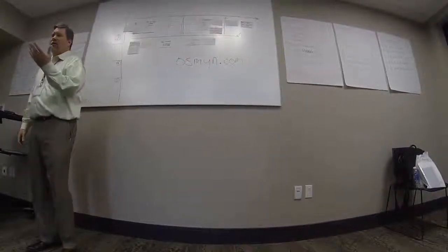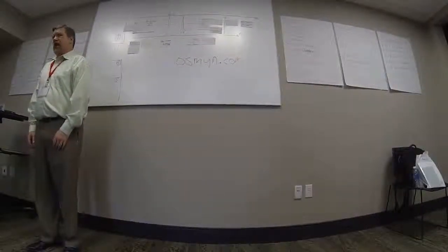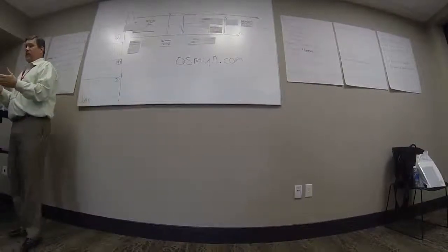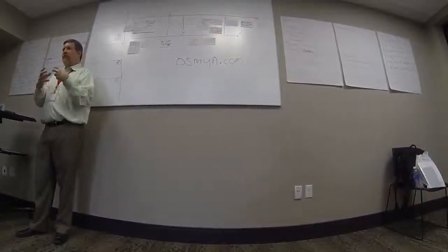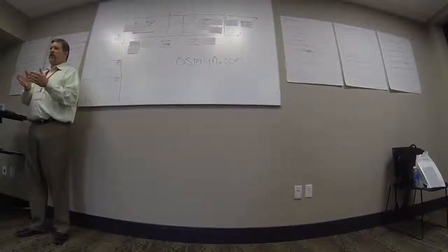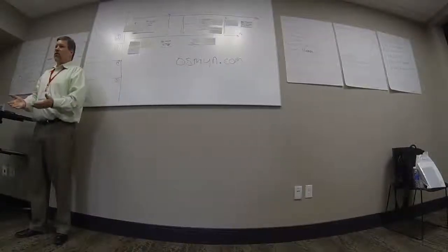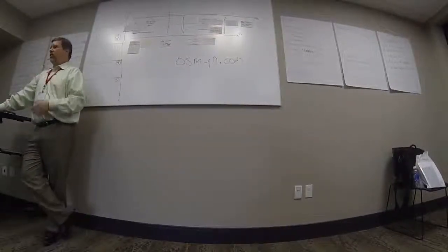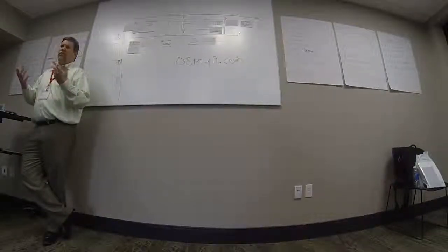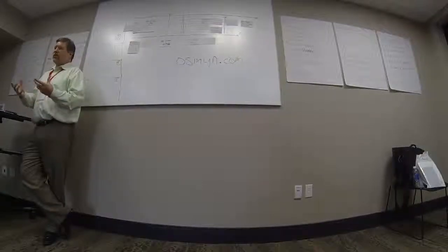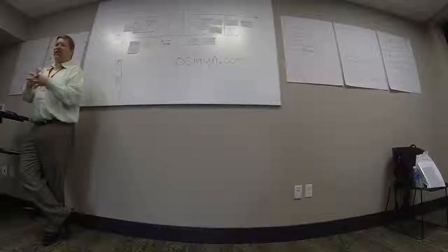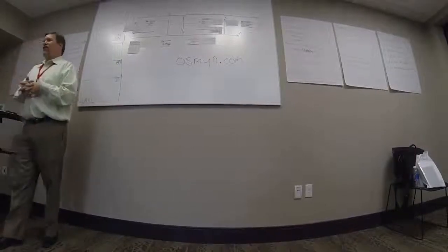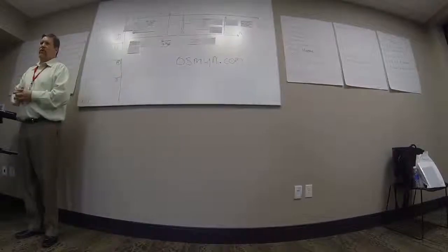The story points, it's more. And then, of course, what happens in our meetings when we go to point things, they go, well, how many hours is that? And you're like, no, don't do that. When we do story points, I always say it's really a couple of things. It's the amount of effort involved and the amount of risk involved. And that's how you decide how many story points you're going to do something. If you have a meeting that's going to take an hour to do, you've got four people in that meeting, you know there's pretty low risk of that meeting going longer than four hours. Now, it depends on your organization's business, but pretty low risk. So now you're going to say, well, if our two-point story took us about two hours to do, then maybe it's a five-point story because it was going to take at least four hours to get done. But it's really dangerous to start making those connections. You've got to resist the temptation to say, well, how many hours is that? Because two points is four hours, and so this is going to take us eight hours to do, so it's eight points.